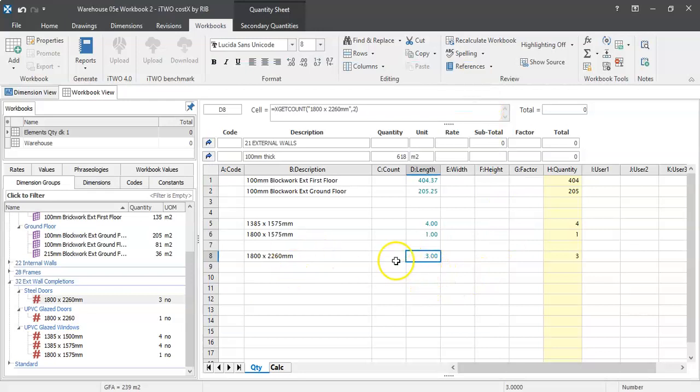Now there's 1 steel door that has 2 leaves to deduct out, so I actually could change that to 4 or just add another one in here. So I could copy, paste just here, and then add that other leaf. 3 steel doors are deducting out of the inner leaf, and then 1 of the steel doors is actually deducting out the outer leaf as well. So that's what you did with Faker. There's nothing I'm telling you that you're doing different here than what you did with Faker. So let's deduct out those by putting in their dimensions.